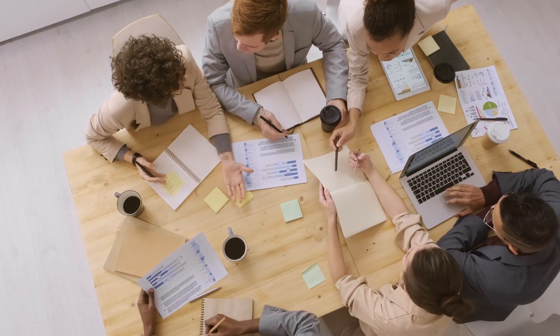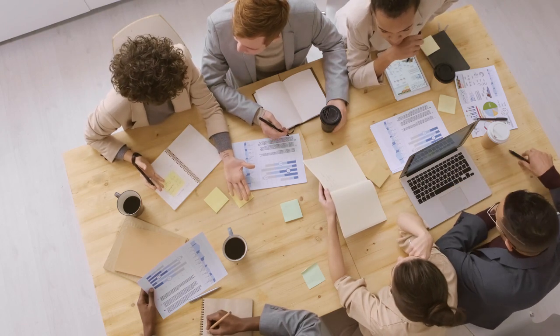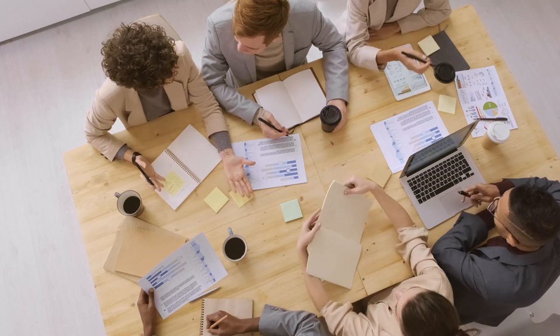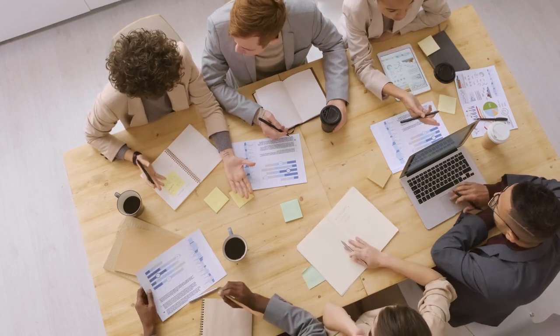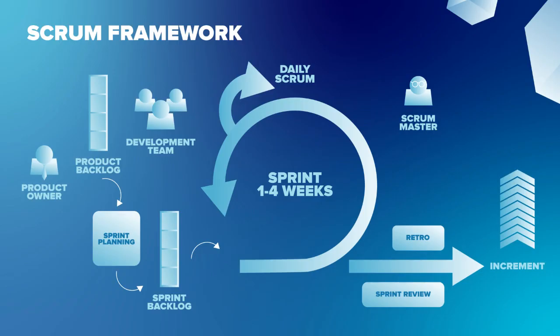First of all, we have to understand what is the Scrum framework and what is the concept of Definition of Done. Scrum is basically an agile-based project management framework for software development in which we divide the work into multiple chunks called sprints. In each sprint we plan, develop, test, and apply tasks. At the end of the sprint we have a product increment, which is basically the task completed during the sprint.